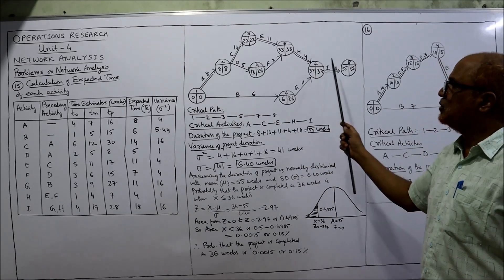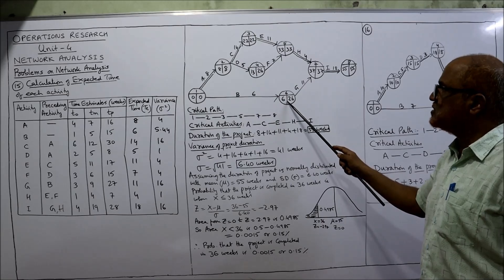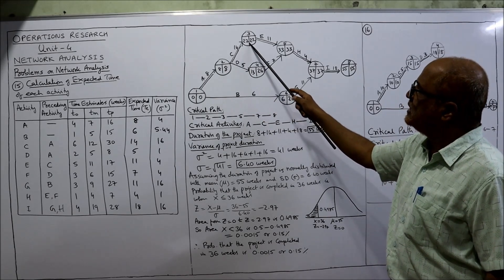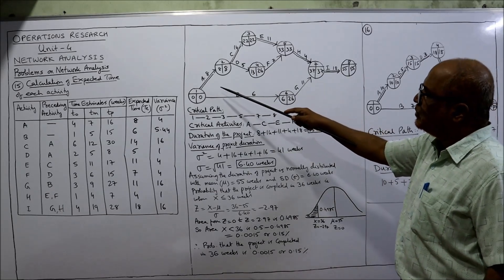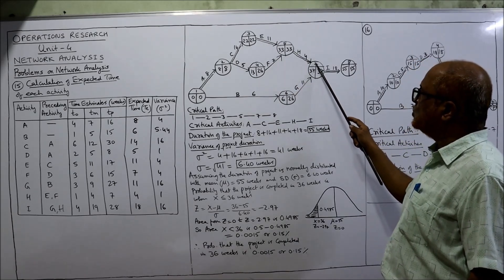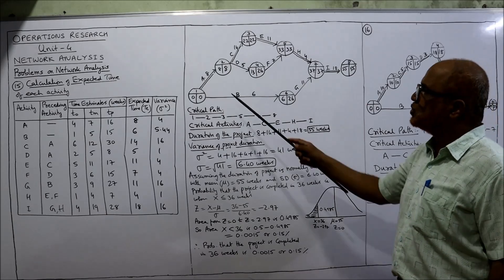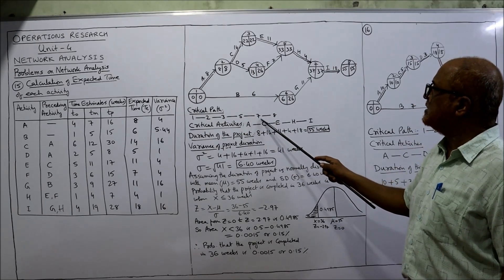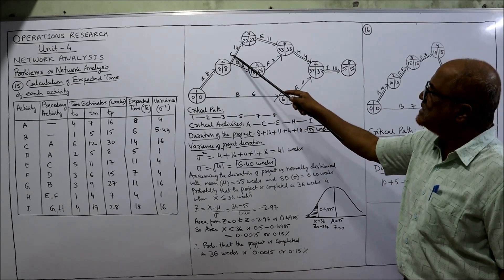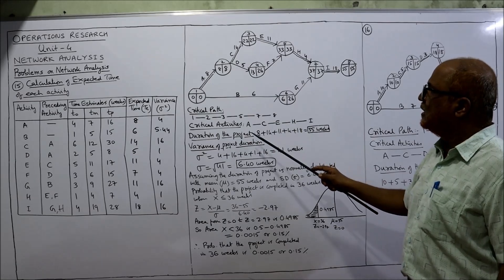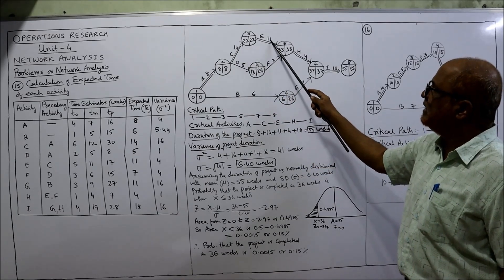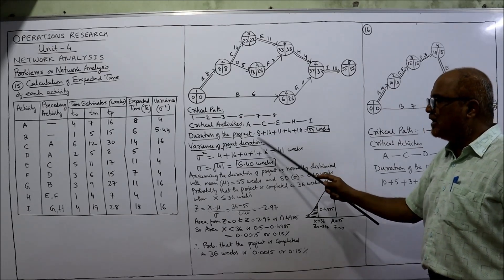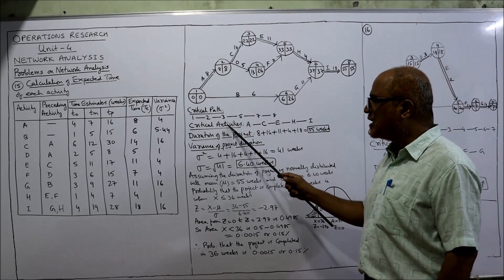The critical path is the longest path from the first event to the last event where EST and LFT values are equal. Event with EST = 6 and LFT = 26 — not same, not critical. Event with EST = 13 and LFT = 26 — not same, not critical. The critical path goes through events: 1 → 2 → 3 → 5 → 7 → 8. Critical activities are A, C, E, H, I. Duration of the project: 8 + 14 + 11 + 4 + 18 = 55 weeks.